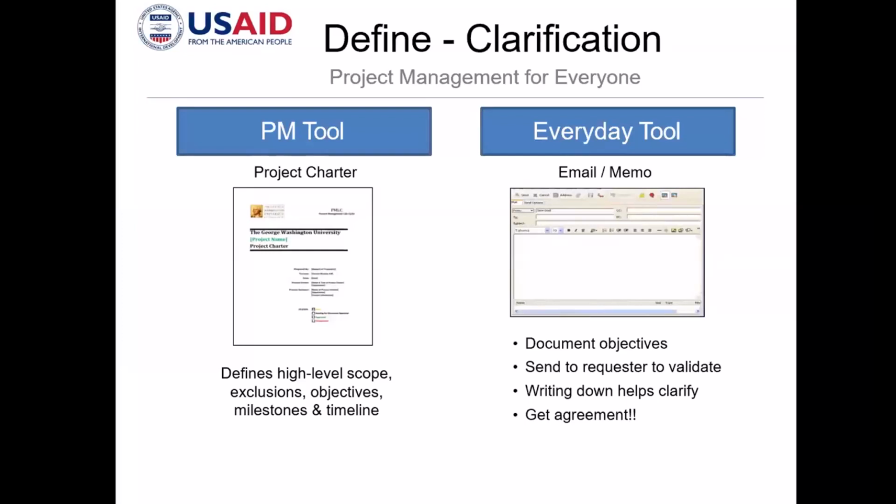The project charter is something that the stakeholders, if they see this document, will authorize that the project is already valid and legitimate, and you can start with the project. So normally this is circulated around as a memo and an email notifying everybody that the project is already alive. And we already have an agreement on the scope, high-level scope, objectives, milestones, and timelines.